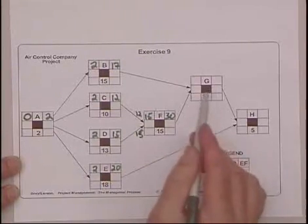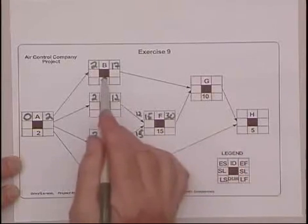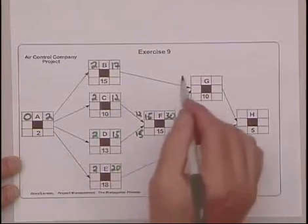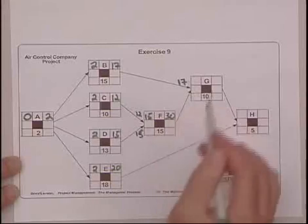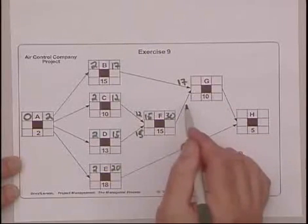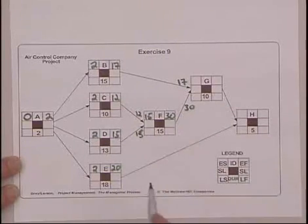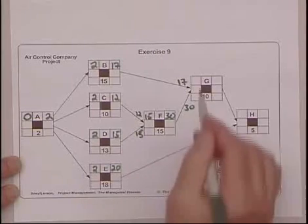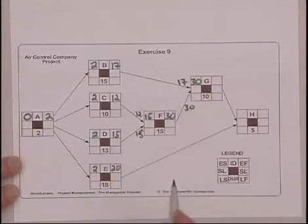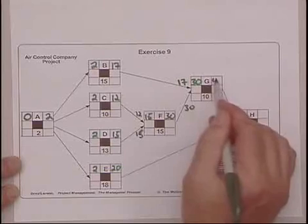And now we have another merge. G can't start until both B and F are done. The earliest B is done is 17. The earliest F is done is 30. Again, we choose the larger number, 30. 30 and 10 is 40.